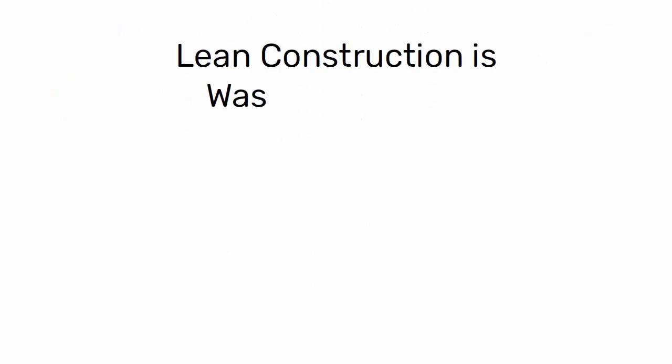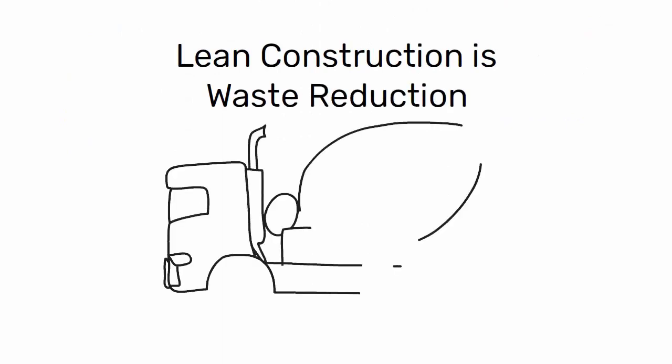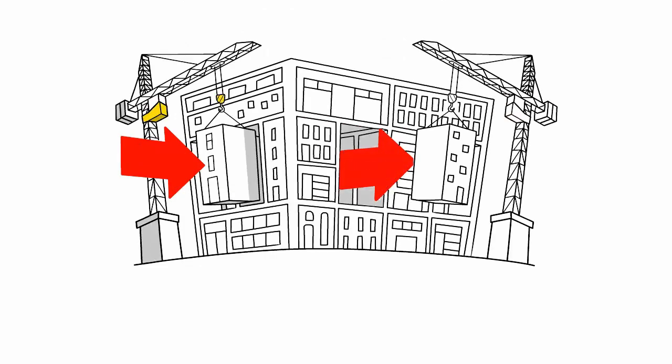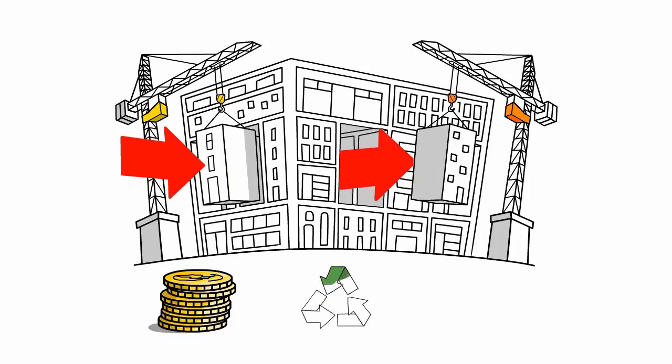Another important aspect of lean construction is waste reduction in inventory and transportation. By reducing the amount of materials on site and ensuring that deliveries are made only when needed, construction companies can reduce costs, minimize waste, and increase efficiency.